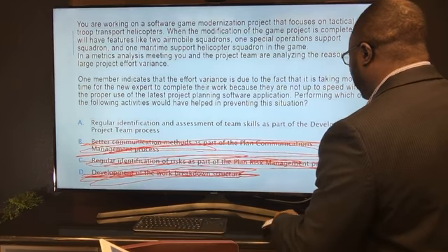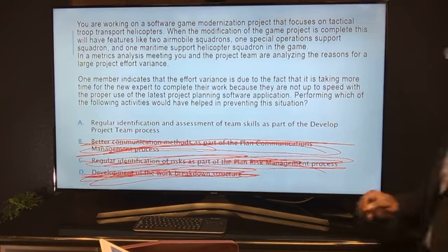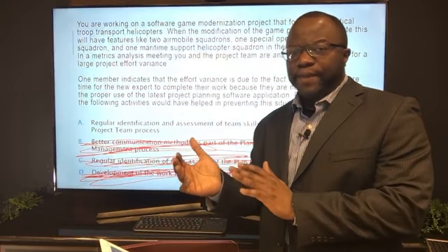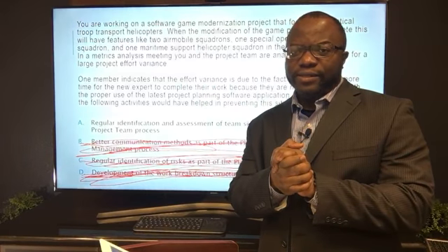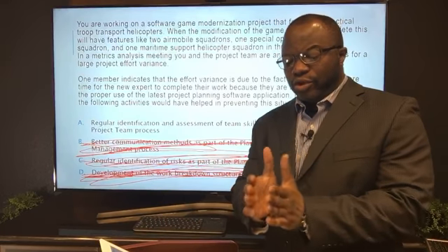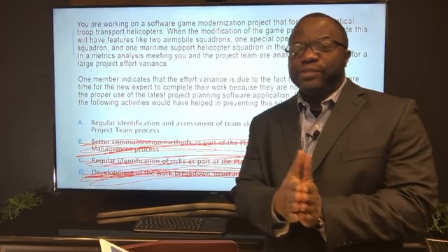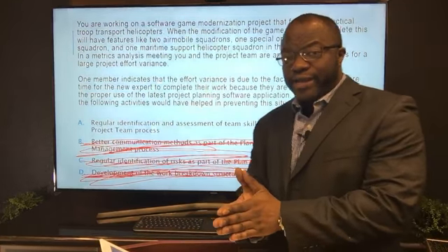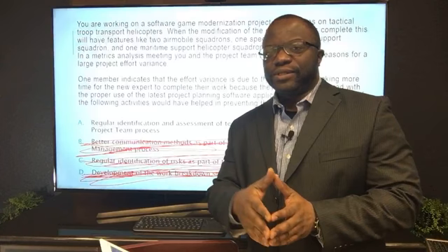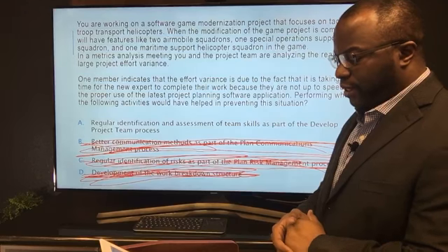I think the big thing is not misunderstanding that executing could actually happen on day 1. You could begin to execute. It's just a group. It's just a category. It's not a time ordering of events. Do you get it? You could be executing on day 1. You don't have to wait till day 10 to execute. You know Phil is assigned to the project. Maybe there's pre-assignment. Pre-assignment even happens before the project is authorized in many instances. So there's a lot of executing, like pre-assignment, that happens far before you get to the middle or even a quarter into the project. All right?